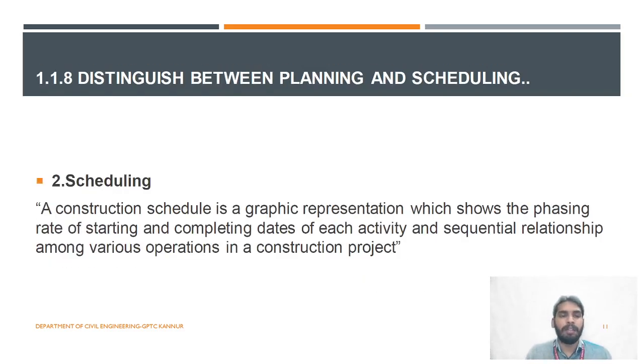Then in scheduling, a construction schedule is a graphic representation which shows the phasing, rate, and starting and completing dates of each activity, and the sequential relationship among various operations in a construction project. It may be a graphical representation. This is earthwork in excavation, from the first day to 3 days. June 1st to June 3rd, the earthwork excavation can be completed.